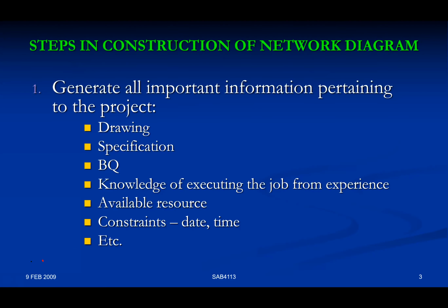The steps in construction of a network diagram, whether it is AOA or AON, the concept is always similar. First, drawing. Why do you need to refer to drawing? Well, if you are a contractor during tendering stage, the information that you will get is only the drawing, specification, or tender document. The tender document will basically consist of drawing, specification, BQ, and then terms and conditions. That's all that you basically have.